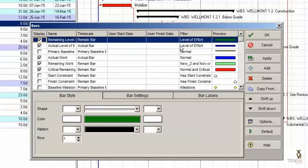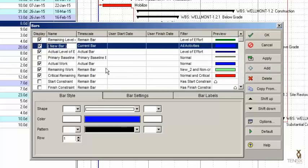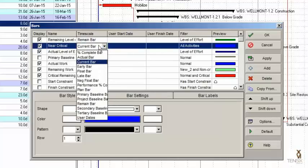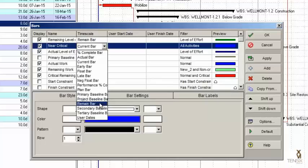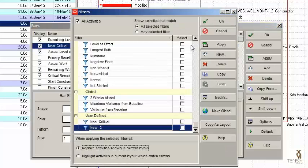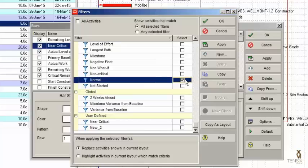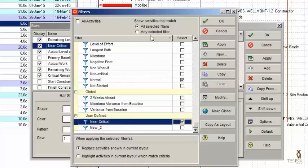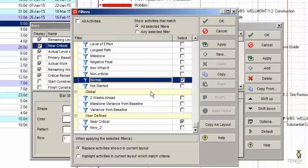To create a near critical bar, hit the plus add button and that brings up a new bar. For the name, let's type in 'near critical'. For the timescale, it's going to be like all other bars — it's going to be remain bar. For the filter, we want to have Normal and Near Critical. Notice at the top I selected 'All Selected Filters', which puts an AND between each filter, so it is Normal AND Near Critical.